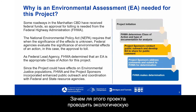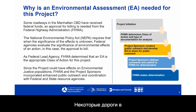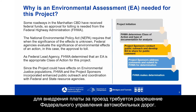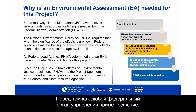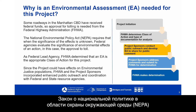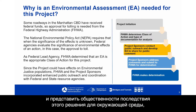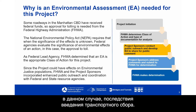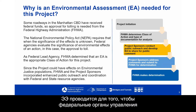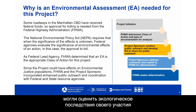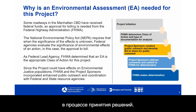An environmental assessment, or EA, is needed because some roadways in the Manhattan Central Business District have received federal funds, so approval for tolling is needed from the Federal Highway Administration. Under the National Environmental Policy Act, or NEPA, the federal agency must understand and disclose the environmental effects of the action — in this case, the tolling. An EA ensures federal agencies consider environmental impacts in the decision-making process.